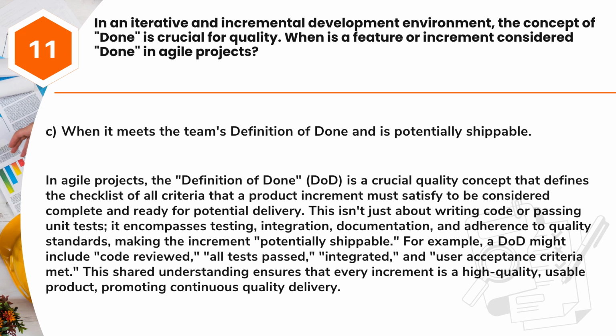For example, a DoD might include code reviewed, all tests passed, integrated, and user acceptance criteria met. This shared understanding ensures that every increment is a high-quality, usable product, promoting continuous quality delivery.